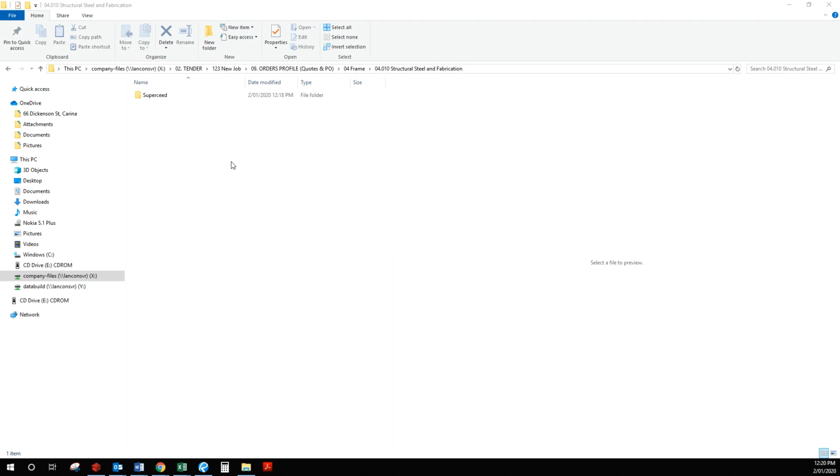Now, when we actually request updated floor plans and engineering from the structural engineer, they may say, oh, you need an additional beam to cover the span of the patio. So then you get that quoted. It will be very easy to calculate. If you have a quote here showing the 2 posts and the beam to the front, and then another quote here showing 2 beams to the front and 1 to the alfresco, it's very easy for whoever's doing the BAPCV to just go, okay, the alfresco one was an extra $350 for the supply.